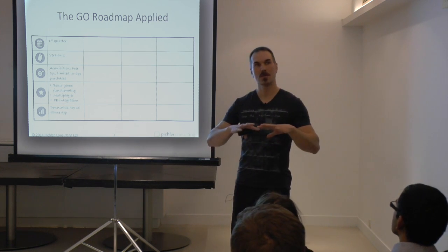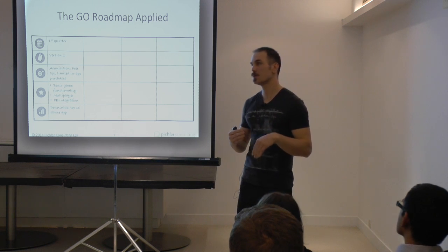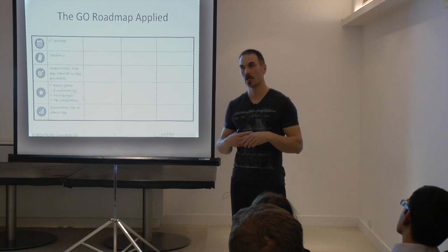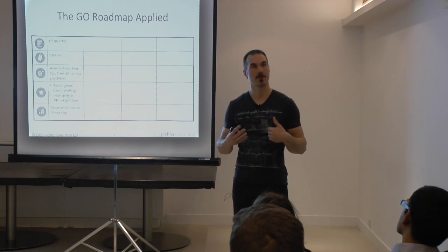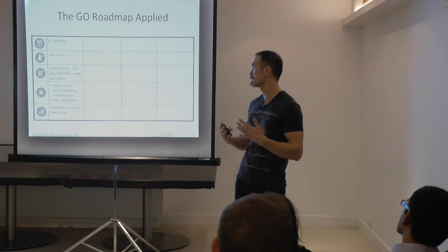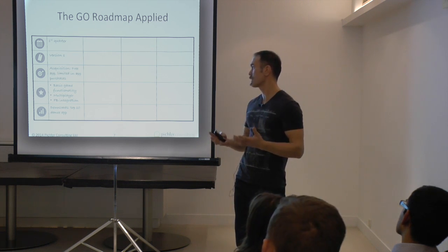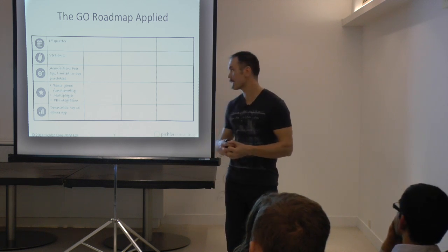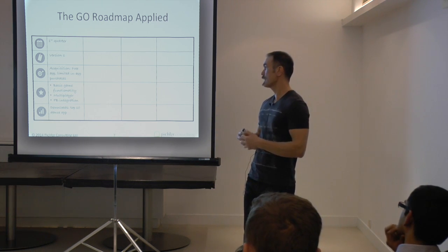And I've purposefully tried to keep it at a fairly high level and not anticipate too much what basic functionality will be provided or how the Facebook integration is done. It may be a snapshot, it may be something else. Similarly, I didn't put any restrictions around how many players should be able to play together in the dance game. And as the metrics, I've decided to go for the number of downloads and the goal of having the game in the top 10 of the appropriate group within the Apple App Store.